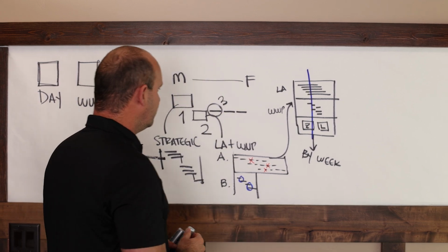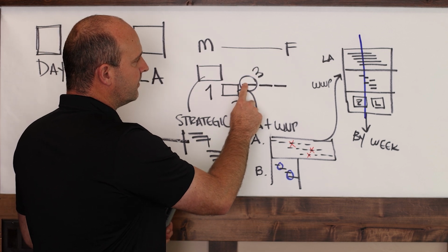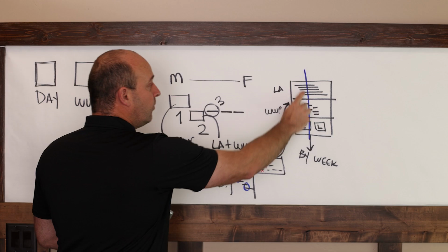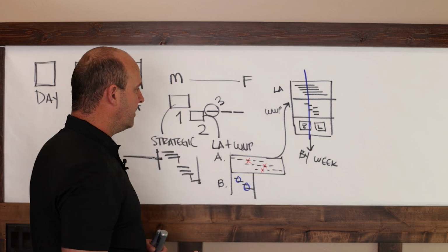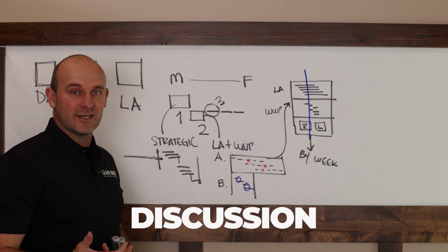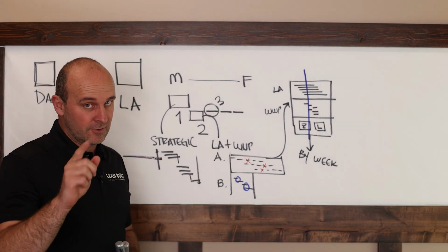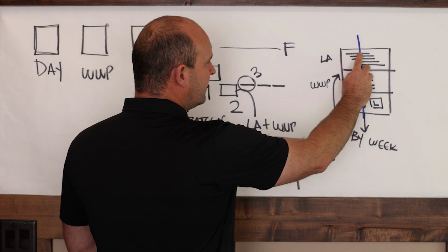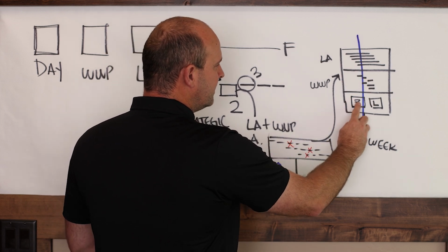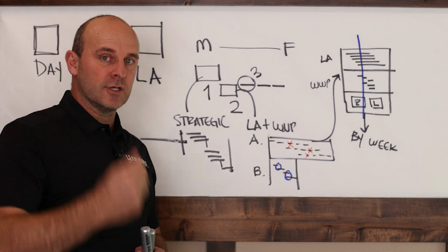So what I like to do is, after the crews start and do their work, you huddle up with the foreman, and you say, okay, what are the things that we need to do tomorrow to really execute well on this project? And that becomes the discussion. And so everybody in the room, in the foreman huddle, afternoon preferably, and there are very good reasons for that, you're going to say, all right, we have these activities and these zones, and you're going to coordinate interfaces, and you're going to solve problems.